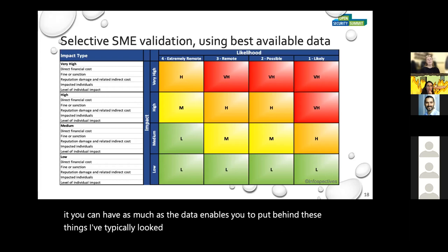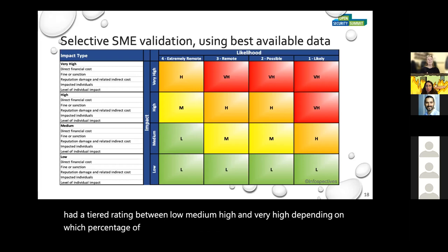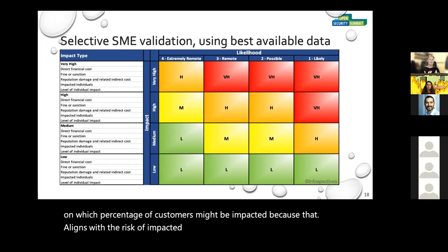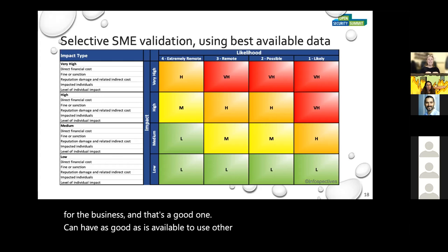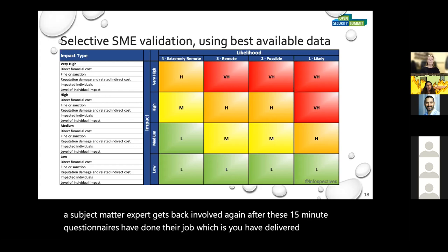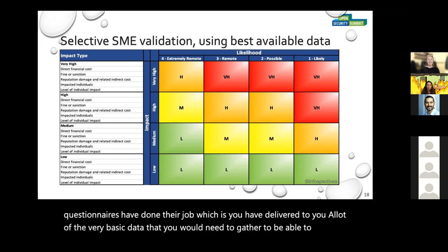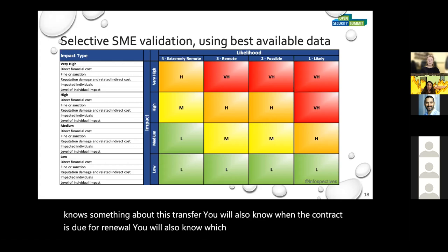I've typically looked at the complete number of customers and what percentage of the customer base is affected, then had a tiered rating between low, medium, high, and very high depending on which percentage of customers might be impacted — because that aligns with the risk of impact and also with the notification cost for the business. This is when a subject matter expert gets back involved again after the 15-minute questionnaires have done their job: you have delivered to you a lot of the basic data you need to start making expert judgment. You'll also know who to go back to who knows something about this transfer, when the contract is due for renewal, and which vendors are involved.